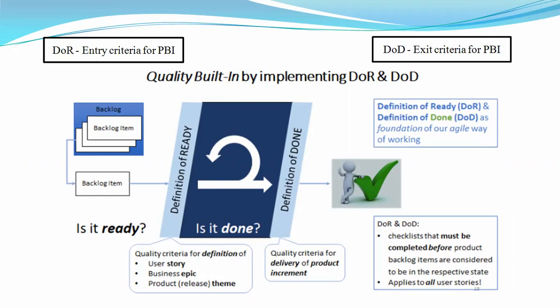See, this product PBI stands for product backlog item. I told you, right? PBI means, just consider now, a user story. DOR means definition of ready. DOR stands for definition of ready, and it's an entry criteria for a product backlog item. So this criteria will tell whether the story is ready to be worked by the team.